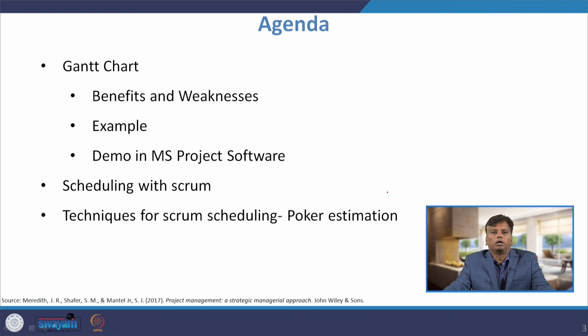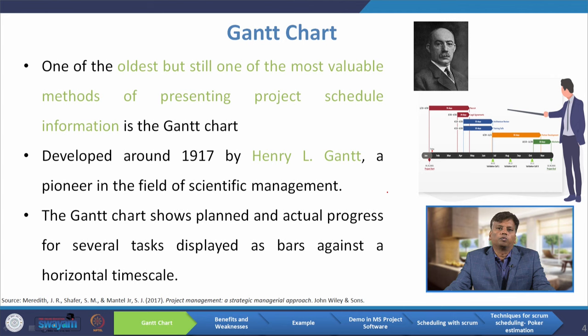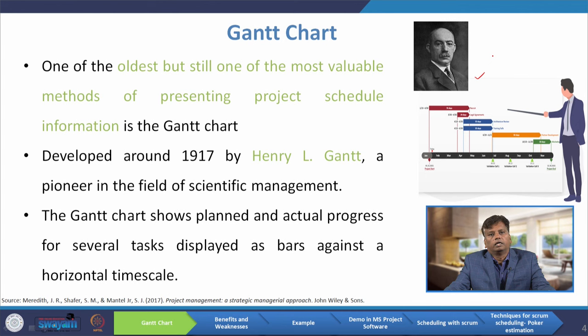One of the oldest but still one of the most valuable methods for presenting project schedule information is the Gantt chart. It was developed around 1917 by Henry L. Gantt, a pioneer in the field of scientific management. The Gantt chart shows the planned and actual progress for several tasks displayed as bars against a horizontal timeline.